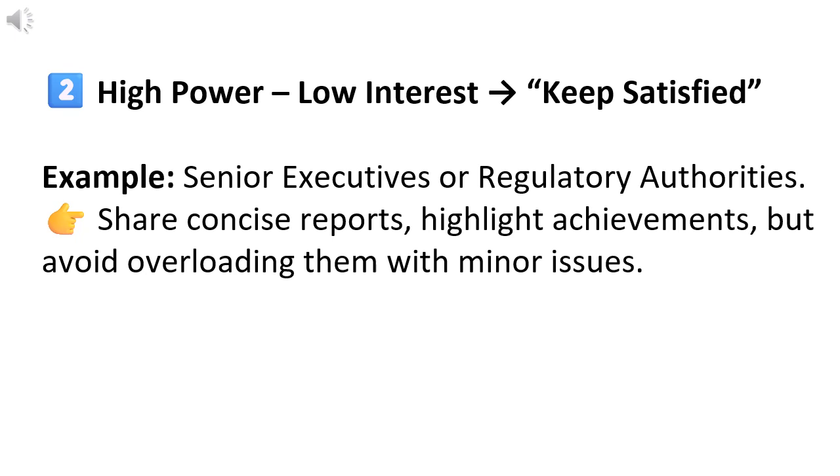2. High power, low interest: keep satisfied. They can make major decisions but may not be interested in daily details. Example: senior executives or regulatory authorities. Share concise reports, highlight achievements, but avoid overloading them with minor issues.